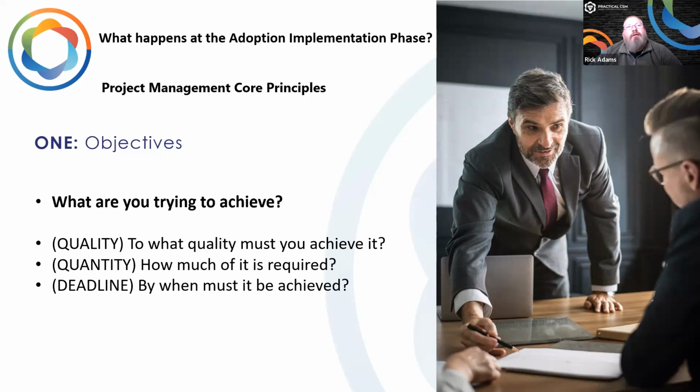And how would we do that? Well, the rule of thumb is, in terms of what we're trying to achieve, for every outcome that they want, have we defined it with 3 aspects: a quality, a quantity, and a deadline? For example, a quality might be naming the team that must be trained and what they must be trained in. The quantity is how many people are in that team, and the deadline is when that team must have received that training and been tested and assessed to be adequate performers in the new task that they have.